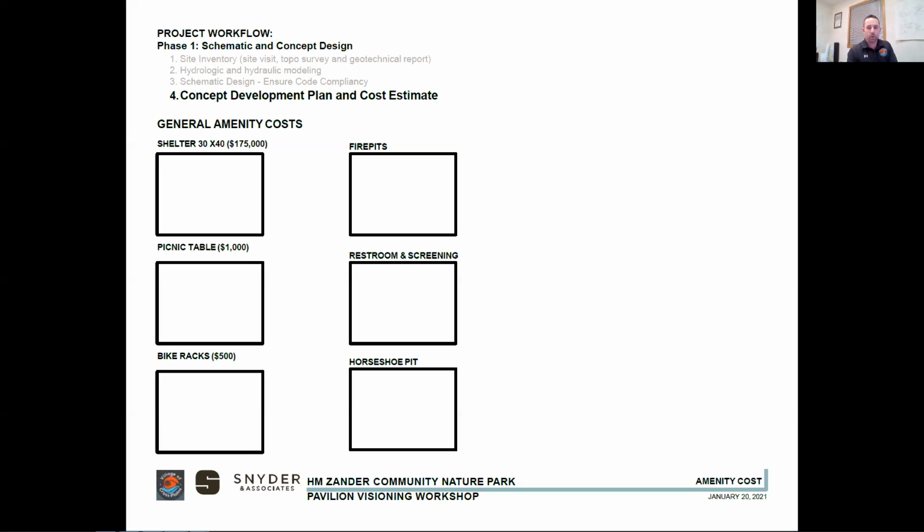I think that's what we need to answer first as a committee, and have that sent on to staff and then on to the village board for that final approval, because they're the ones at the end of the day that are going to drive this forward. When we realize we can do a 4 post or a 6 post or an 8 post, whichever we can do, we realize at that time we can do the project in that location. And now let's start talking about the schematics and what it's going to cost.